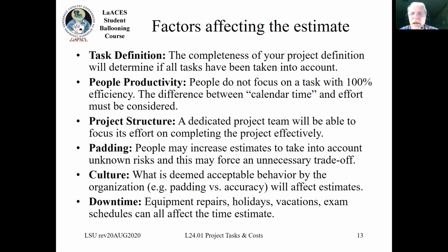Padding is some of the worst things or the easiest things that can screw up your schedule. Whenever you are doing an estimate, do not pad. Do not add in, quote, contingency, unquote, to take into account things that you don't know about.